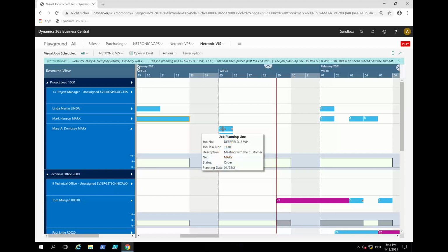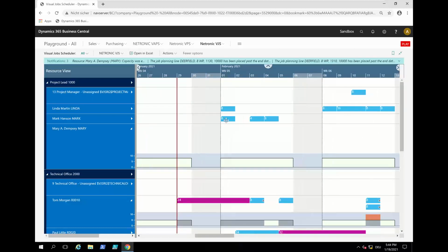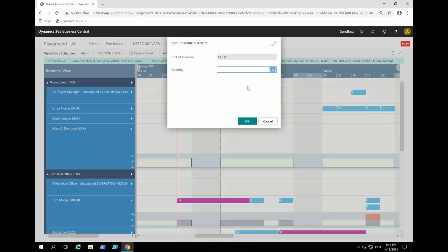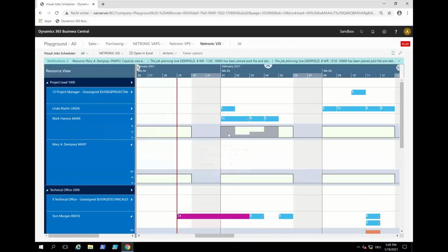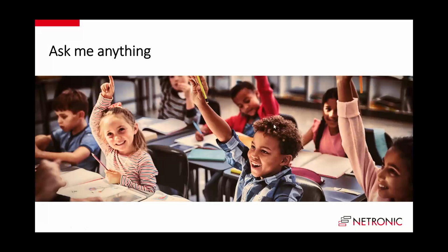So either like this, or if this would not be an 8-hour task, but a 10-hour task, like I change it from 8 to 10, then we would show it on the Monday and Tuesday, but have the resource working on it 8 hours that day and 2 hours on that day. So I hope that this answers the question. That's not part of the things that were new, but this is something that could come in one of the intro webinars.